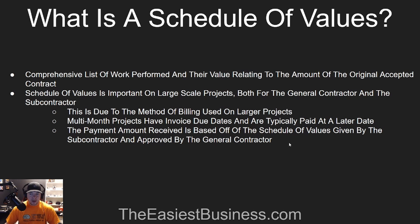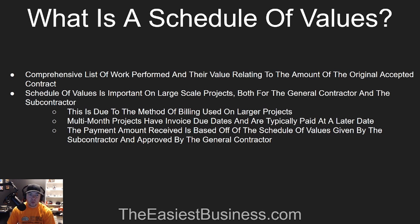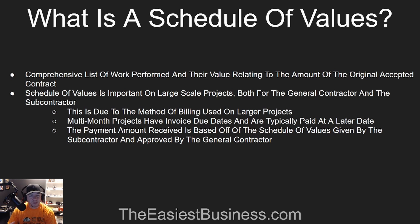So what is a schedule of values? A schedule of values is basically just a list of work performed and their value relating to the amount of the original accepted contract that work represents. A schedule of values is very important, especially on bigger projects, both for the general contractor and the subcontractor.